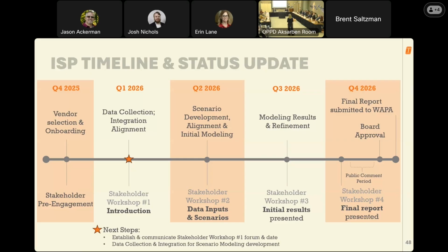Yeah, that's helpful. And maybe this is repeating some things we've talked about, but there was a lot discussed over the last several months. Talk to us about the SPP study process and how the results will be integrated into our ISP. Sure. The resolution is clear on when that process needs to be started. From the time that process starts via the tariff, SPP has a year to perform their analysis work. We're cautiously optimistic it may be completed sooner than a year, but we have to generally assume that SPP will use the full time allotted in the tariff.